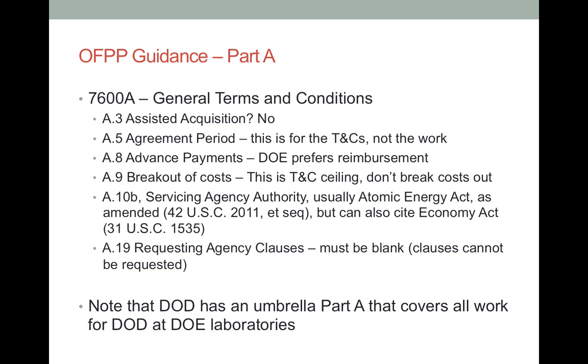A workaround for this is to add requirements to the project-specific statement of work. If the laboratory is willing to comply, then costs associated with those terms will be charged as direct costs to that one customer.